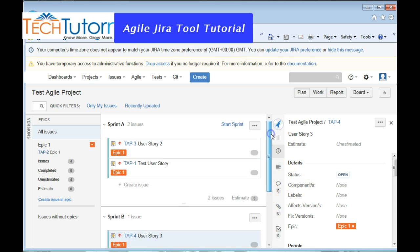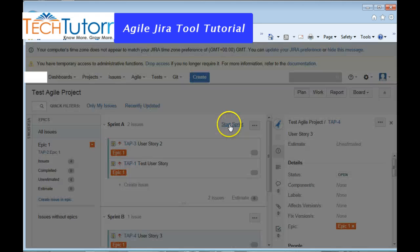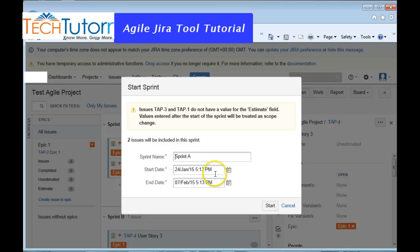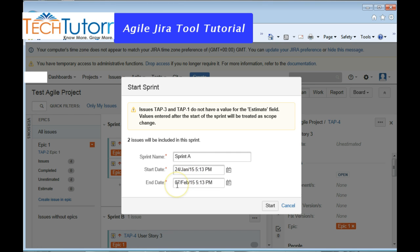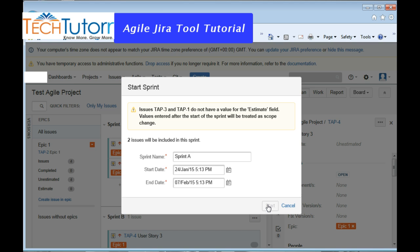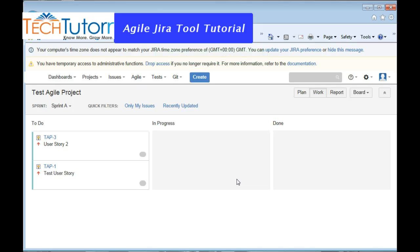Once you have done that, you can always go ahead and start the sprint. So let's just assume that the sprint starts from today, so I'm just going to say Sprint A starts today on 24th of Jan, and it has taken two weeks—by default it takes two weeks of sprint, so I'm just going to keep that. You can always change the dates as you like, and you can say Start. So with that, it has actually created the sprint and officially the sprint has started.